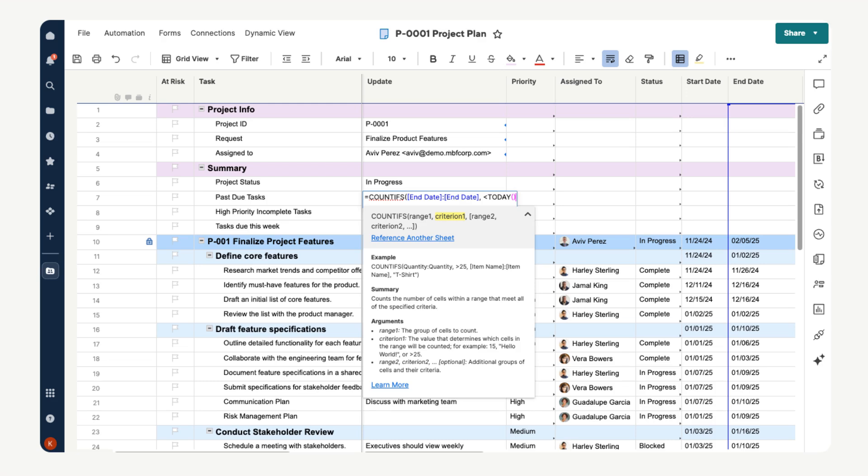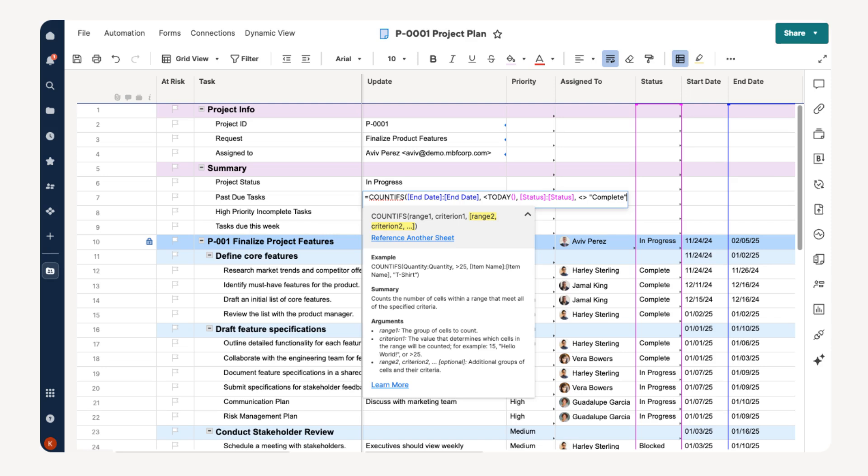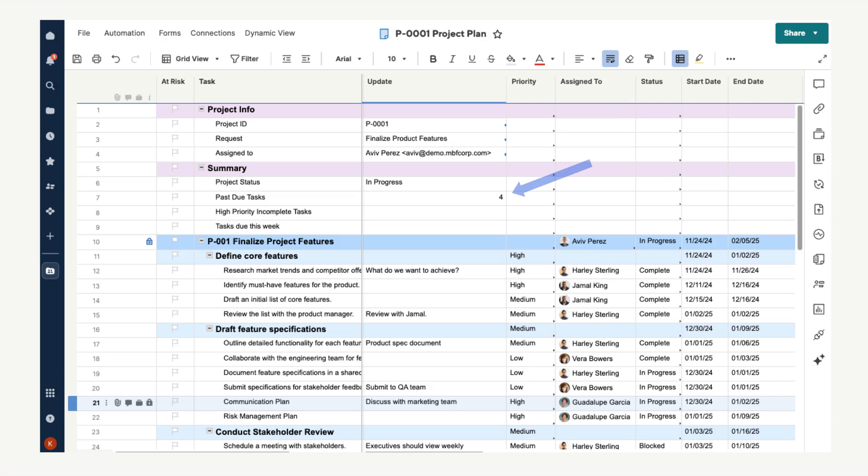Then enter a comma to move to our next range and criterion. Now we want to count tasks that are incomplete. Our range is the entire status column. Our criterion is any status except for complete. The less than and greater than arrows together mean not equal to. Then type complete in quotations. Close the parentheses to finish your formula. Hit enter and our formula returns 4. That means there are 4 rows that have a due date in the past and are not yet completed.